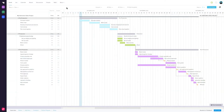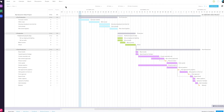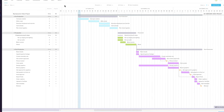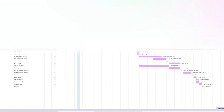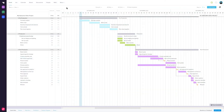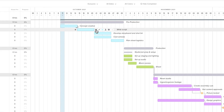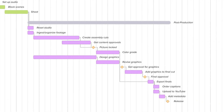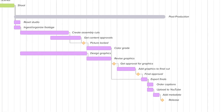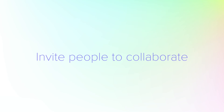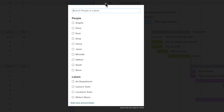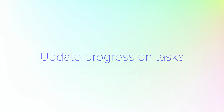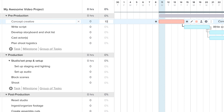The Gantt chart is a useful way to view the full scope of your video production timeline. Not only does it provide an overall view of how your project is progressing, it allows you to see how any changes to the plan affect the timeline and important delivery dates. Tasks in each phase typically have to be completed in a particular order — for instance, you can't develop an accurate shot list before you have a script. Make sure work gets done in the right order with dependencies. Call out key dates, deadlines, approvals, or deliverables using milestones. And collaboration is essential — make sure there's no confusion about who's doing what by assigning people and teams to tasks, and update percent complete as you work through tasks and milestones.